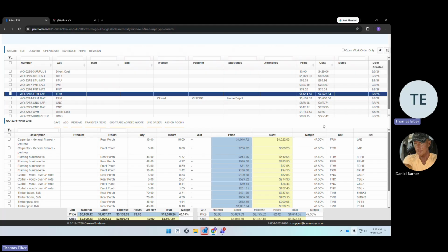You put both of these vouchers into one. Let's assume this was still open. You could merge these together and then assign it to one subcontractor and voucher it. Done. You've got one total to send to that person. So a voucher is allowing us to allocate that money to spend on vendors for material or subcontractors to accomplish work. So the SCA, I had mentioned that document being sent through Adobe. You have to understand how much money you have in order to start negotiating with your subcontractors.